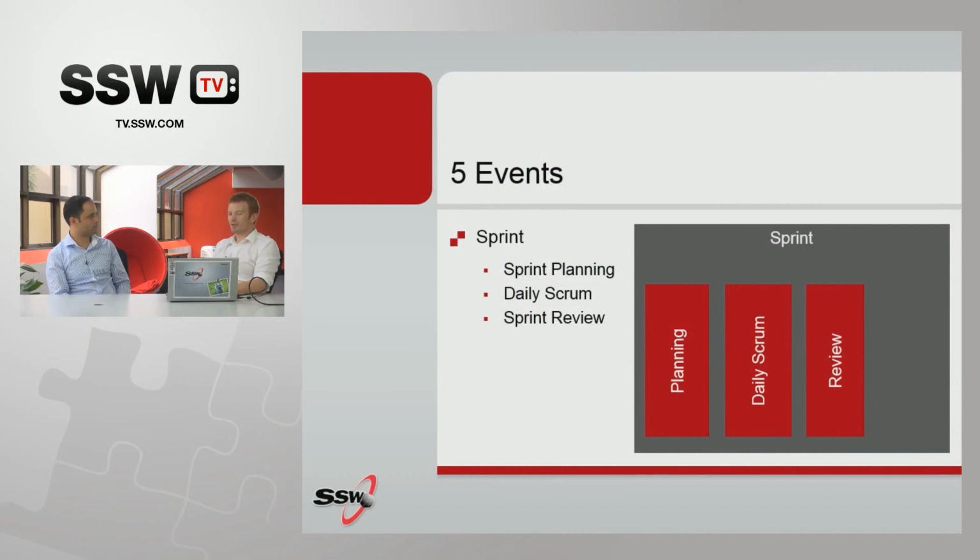So then we move on to the review. I've heard this called recently, someone said the sprint demo, and I think that's probably a better name for it. What the sprint demo is about is, at the end of your sprint, when you finish your work, you are going to demonstrate the increment of software to the product owner. And the whole purpose of this, and this is why I like the word demonstration, is that you can get feedback from what you've built.